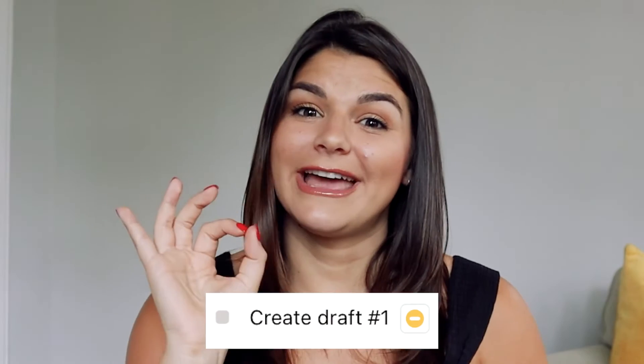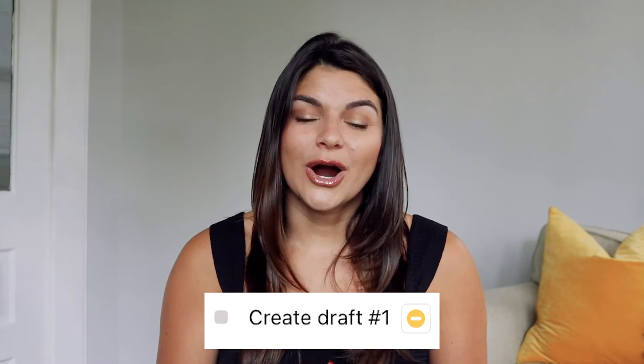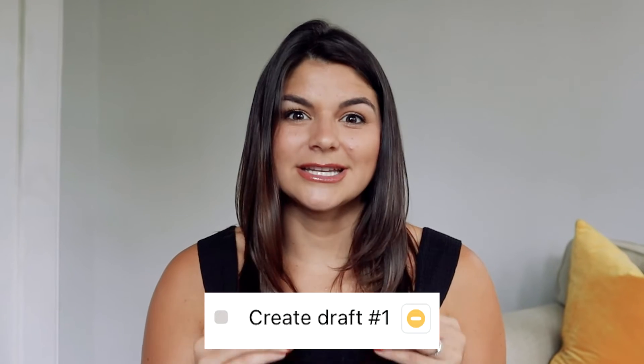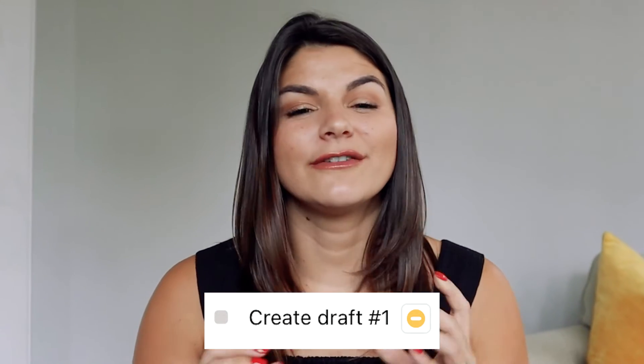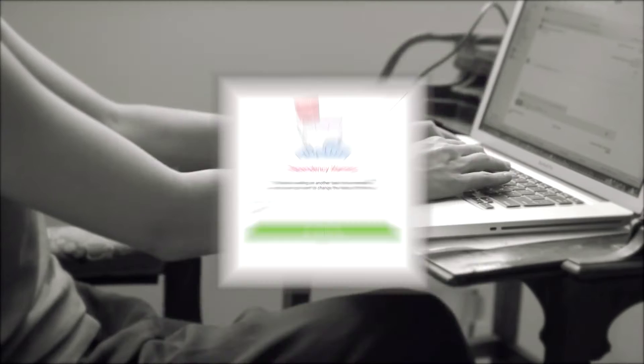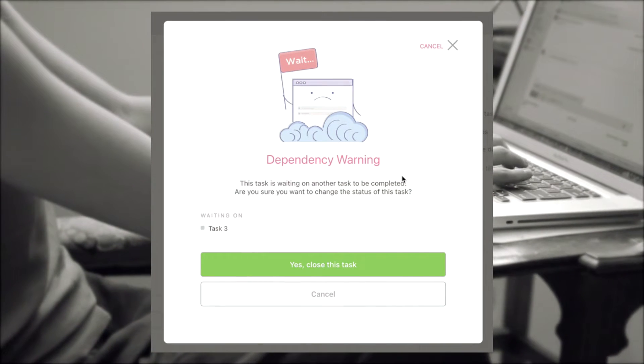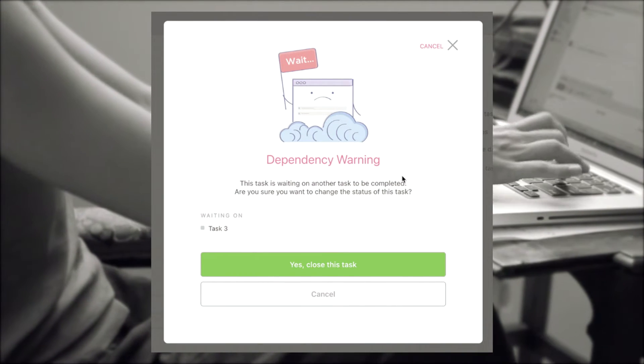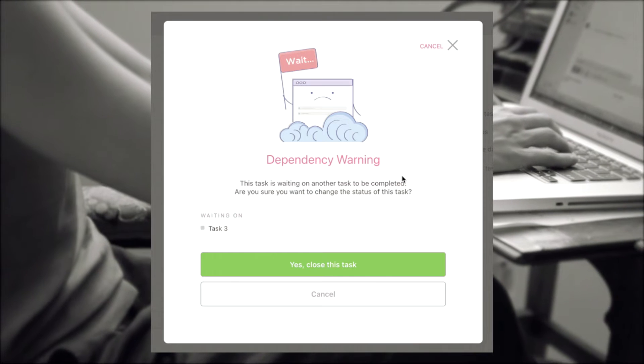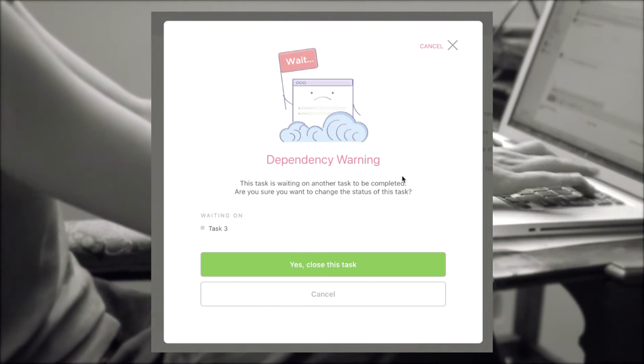If you go to do your job and you have a yellow dot, that means you are waiting on someone to complete their task before you can do yours. And when you go ahead and try to check off a task that has a dependency, it's going to say wait, hold on, it looks like you're waiting on something to get done. Can you actually go ahead and check this off?